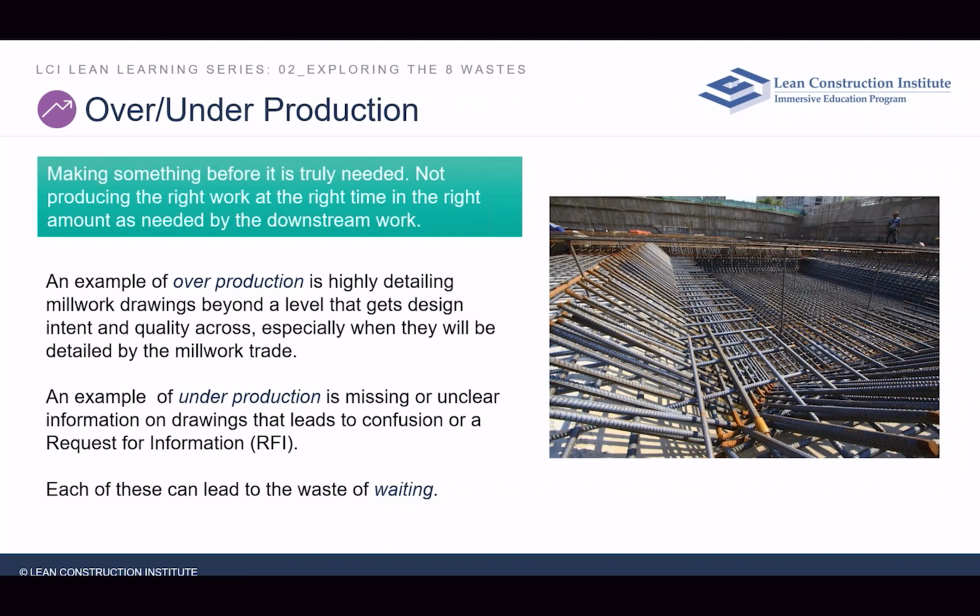I had an occupational therapy space once that we were building out. The architect was saying, this needs to be a level 5 finish. That's the standard for the client for every wall space inside their facility. And if anyone knows what a level 5 finish is, it takes a lot of labor and material to get a wall to a level 5 finish. This is going to be painted. This is not going to have wall covering or anything else on it.